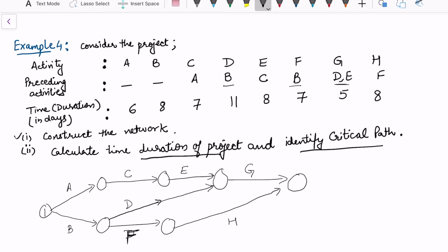We have already covered this point in the last video. Every project should have one ending and one starting point. And no line should be left incomplete. Every line should have a meaning. Every edge should have a meaning. It should be an activity and not without any meaning.